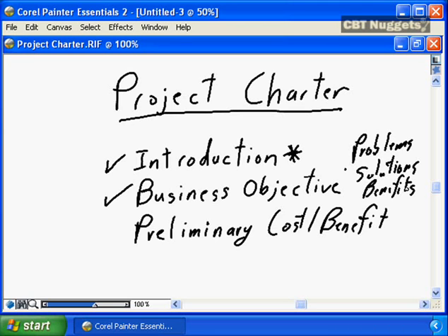We're sending this to senior management. We are soliciting their approval to proceed to get a project initiated. And my experience is, any document that you send up the chain to senior management for approval must absolutely contain a cost-benefit statement. It's wonderful to say we have a business problem and we have solutions and here are the benefits, but management isn't going to approve any document for committing of funds, committing of resources, until they know what the overall cost benefit is going to be.